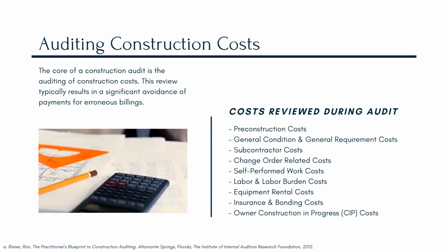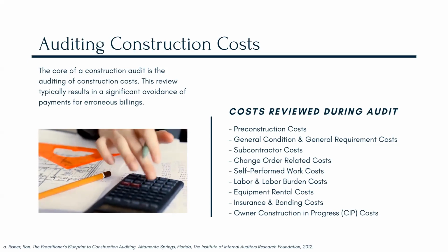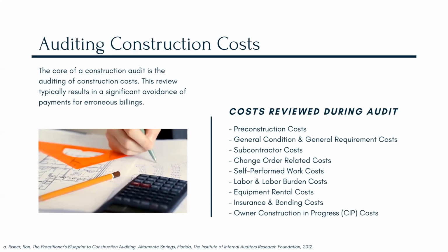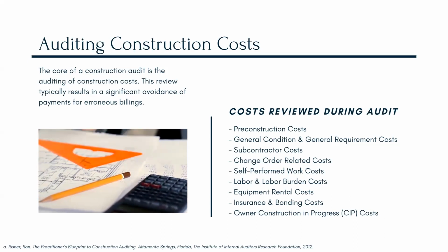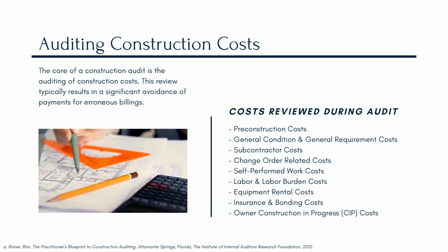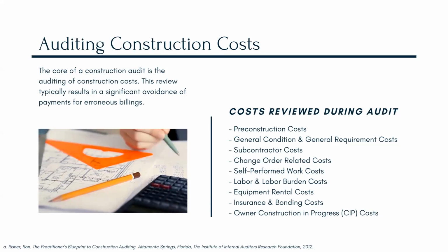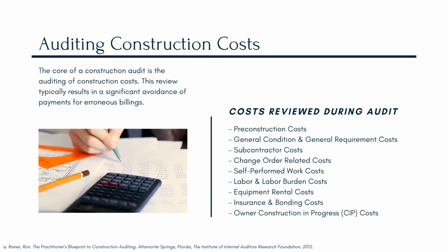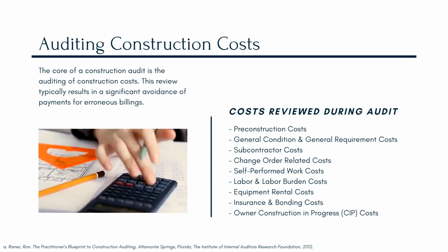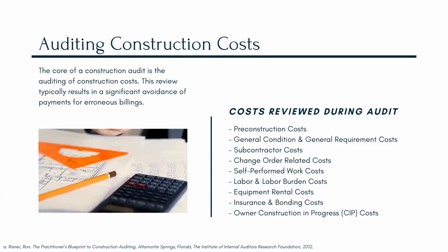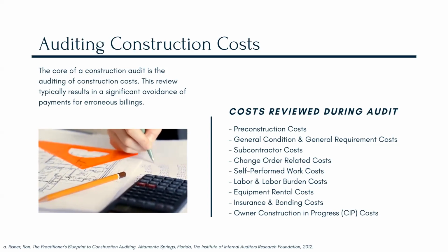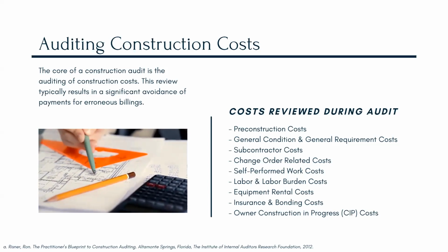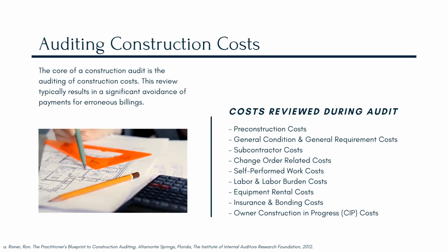So the audit firm or the auditor will take that claim to the general contractor and explain the basis for it. In a prepay model, the recommended course of action is to adjust the pay application so that it's based on the accurate contractual expectation of billing or the accurate quantity of material or quantity of work performed, depending on what the finding was based on.